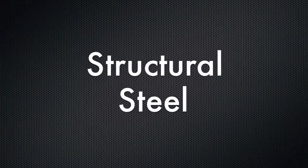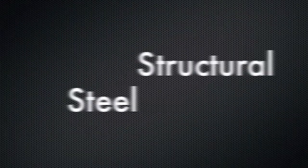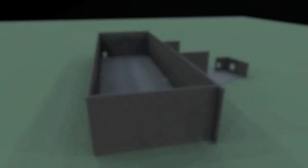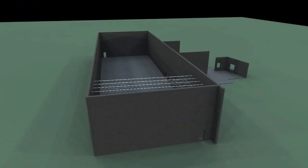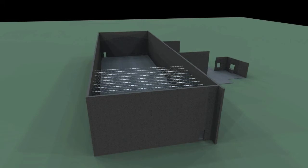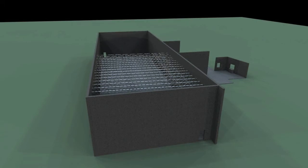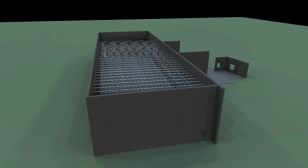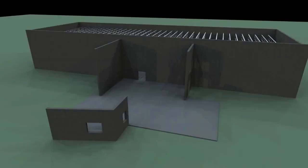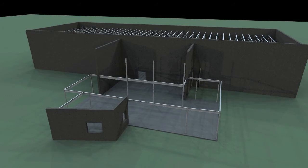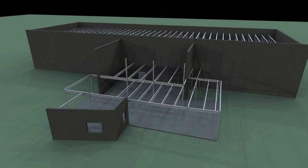Let's take a look at the building's structural steel. The structural steel sequencing will begin in the warehouse with the structural steel trusses permanently supporting the tilt wall panels. The structural steel in the office building will be the predominant source of structural integrity given its small amount of tilt wall and will begin after the warehouse structural steel has been completed.